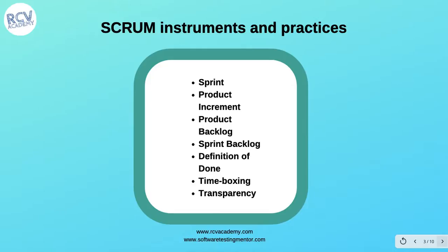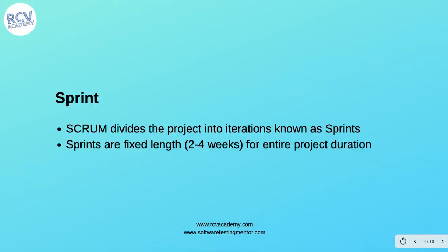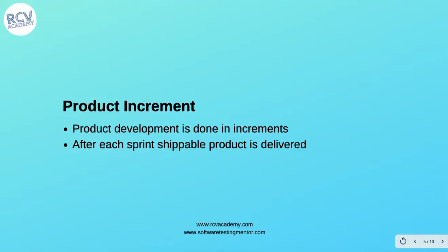What is a sprint in Scrum? Scrum divides the project into iterations known as sprints. Iterations in Scrum are known as sprints, and these sprints are time-boxed iterations. Sprints are fixed length of two to four weeks for the entire project duration. Any iteration in Scrum is known as a sprint, which is a time-boxed cycle of two to four weeks, depending on the agreement within the project.